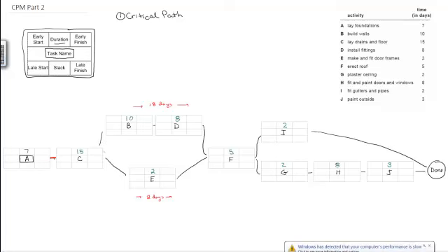So I can move that 2-day activity a little bit earlier or a little bit later in the schedule without impacting the final project time. So my critical path in this case is the longer path here, up through B to D, and down to F. This stuff can't get delayed or the project will be longer.